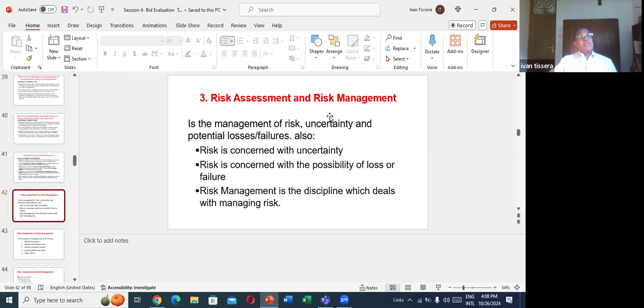So if you don't consider this risk factor as a tool of evaluation, or you forget about the risk, we assume no risk. For example, we say drugs purchasing, right? The delivery period is 2 weeks, for example. So we don't consider the risk factor and assume all bidders selected will deliver the drugs within 2 weeks.